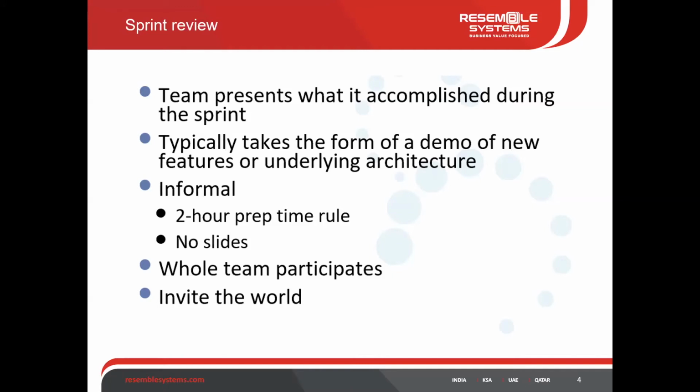They talk about their accomplishments, and that also becomes the form factor for the demo to the business. It should be completed within 2 hours. It is more like an informal meeting. There is no need to come up with a presentation or anything. You can go with an informal kind of presentation, and the whole team will be part of that. So it's very important to have a sprint review.